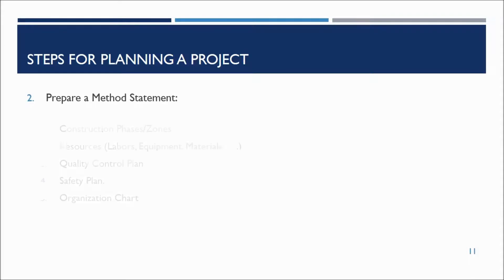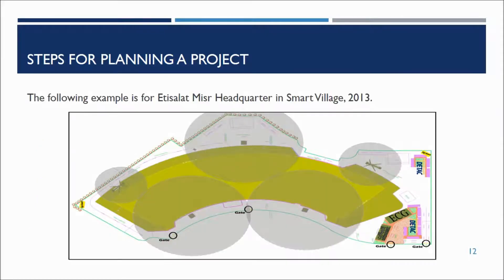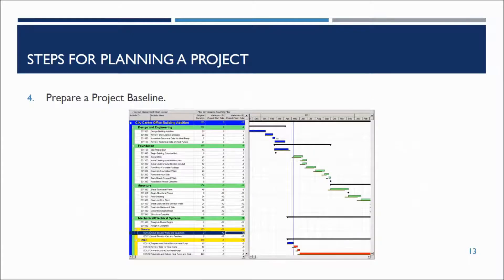Second, prepare a method statement showing construction phases, used resources, quality plan, safety plan, and the organization chart. Third, develop a mobilization plan. This slide shows a mobilization plan for a project located in Egypt, illustrating the construction team's location and the cranes used. Finally, prepare a project baseline.